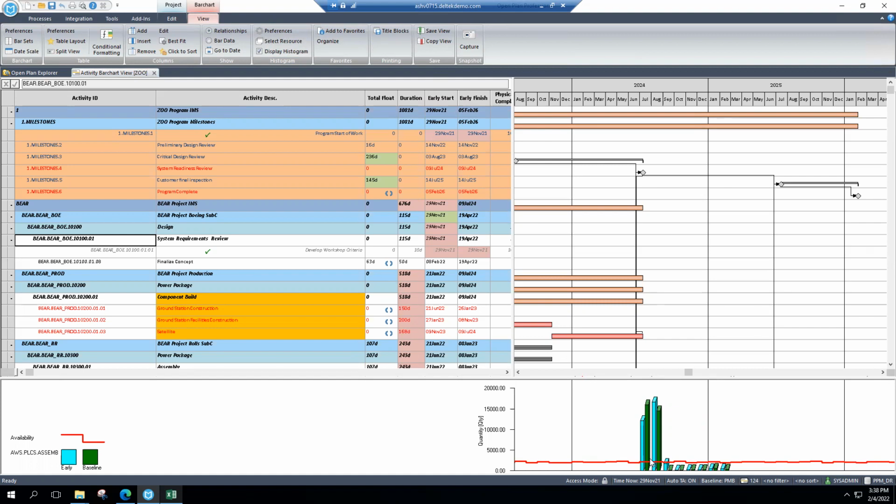I can bring in actual contractors. I can put out recs. I can also try and smooth this out. I can see if there's room to potentially reorganize or delay work, kind of flatten things out a little bit. Open Plan can actually help with automating some of that smoothing. I can also assign alternate resources. In this case, this file is built with a project labor code. If it was built with individual named people, I can swap one resource out for another. So I have a lot of options, but at least I know now at the beginning of 2022 that come mid 2024, I'm going to have a resource crunch, and then I have time to do something about it.